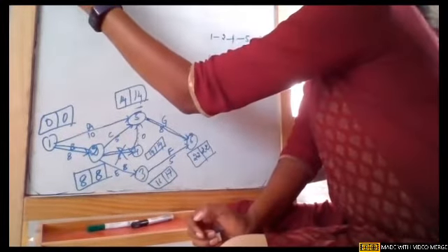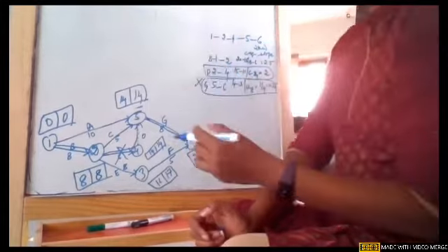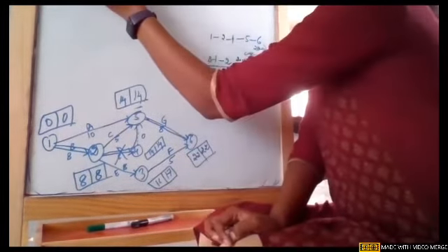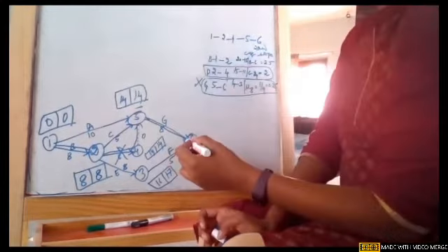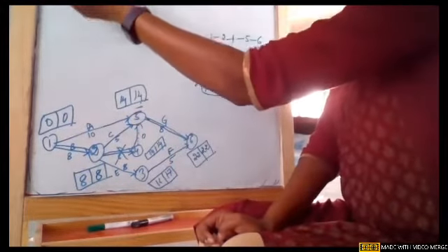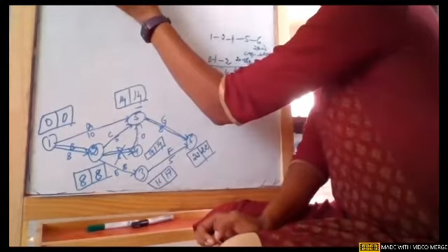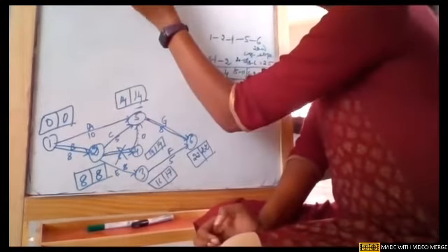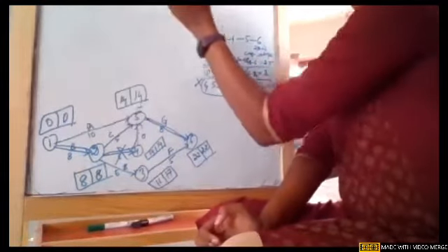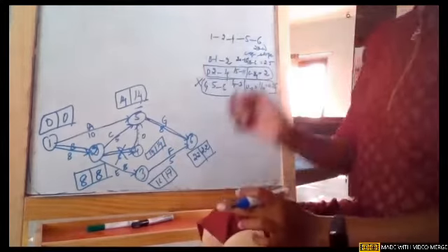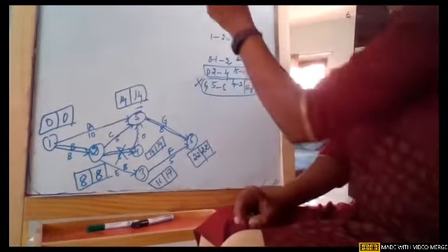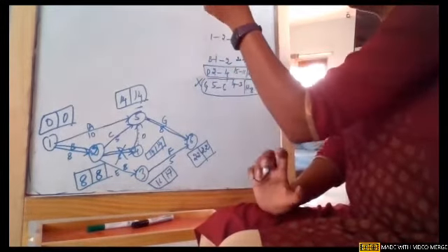Now the duration is 22 weeks. We crashed activity G, and the duration has been reduced by 4 weeks, earlier it was 26. The normal cost will remain the same, which is 73,000. The indirect cost is 22 into 7 into 400. And now the crash cost, what are we supposed to do?